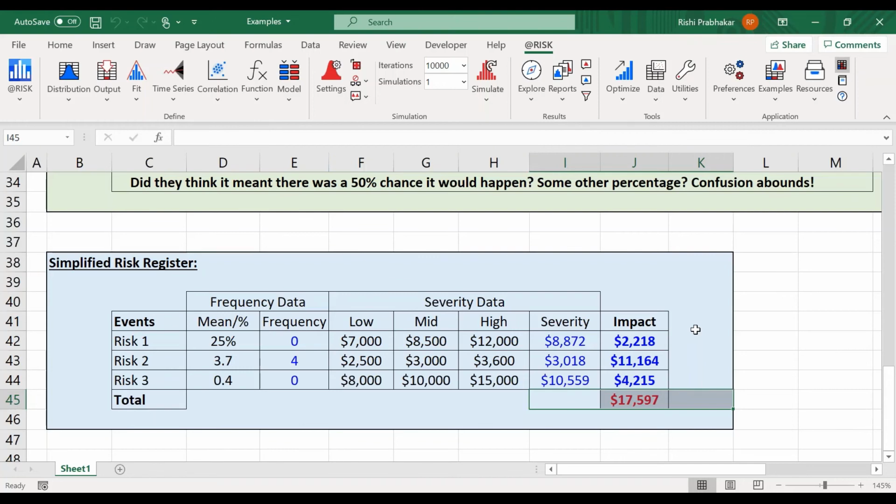Compounding includes the ability to model concatenated events, such as if event A does occur within the event, then event B has a non-zero frequency to occur. Okay, so if I've understood the question correctly, I think that's not a question of the compound itself. It will behave how you want it to. What you would do is include that logic over here in the frequencies.